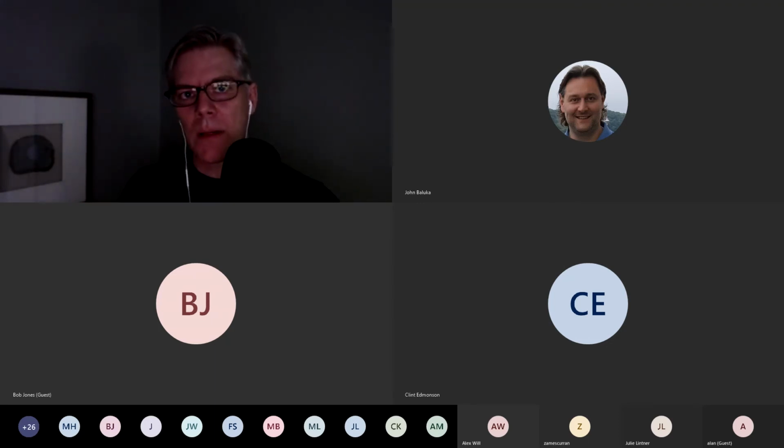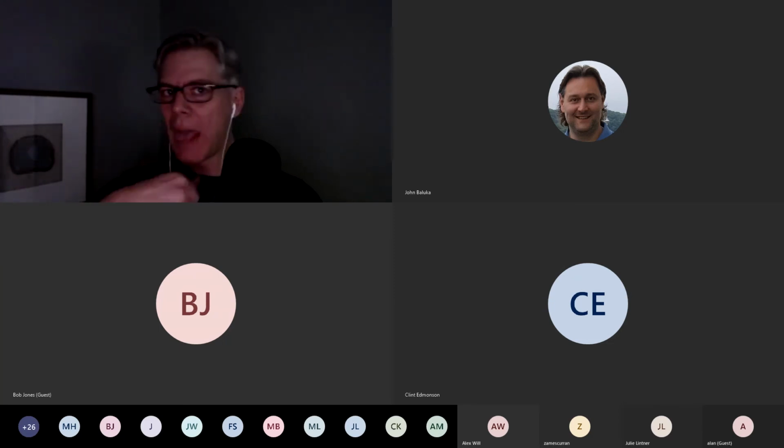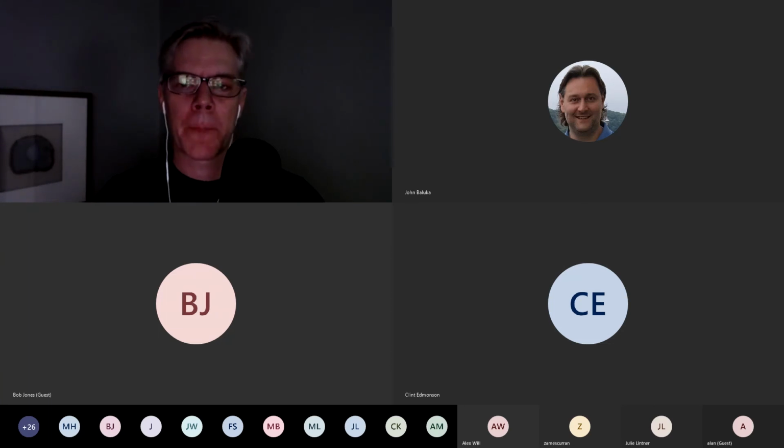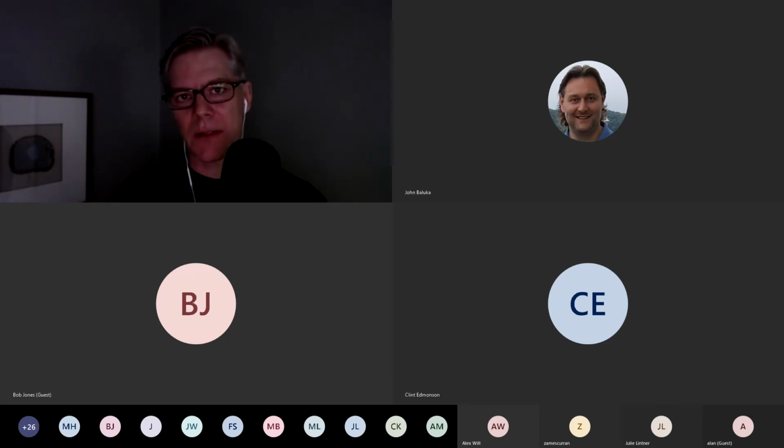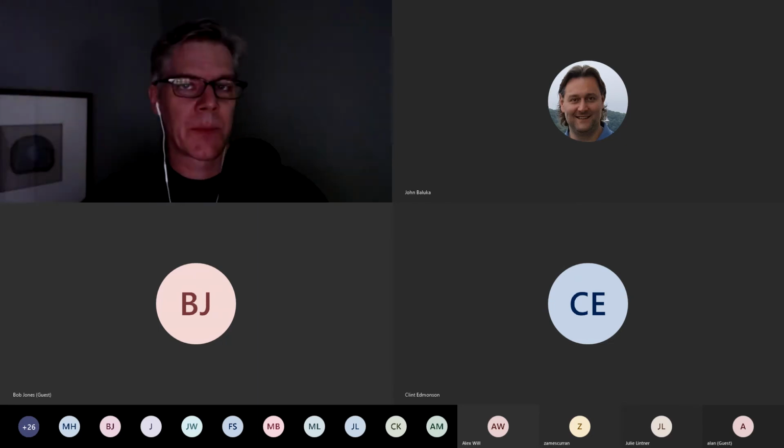And I need to quickly, in an hour-long conversation, try and get as much scope out of them as possible so that I can take a guess, at least an educated guess, at how many hours I thought it would take. And then I'd get back to them with a proposal that said something like, well, we think it's going to be 100 hours at $150 an hour. So that works out to blah, blah, blah. But that's just an estimate. So don't hold us to it.